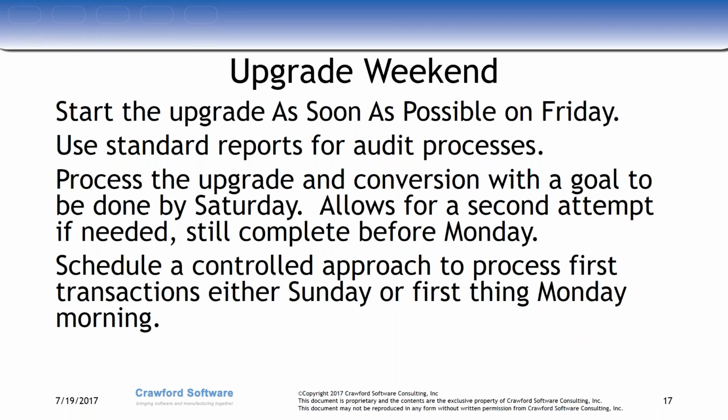We also include in our templates and our recommendations that you use audit reports. And we recommend using standard audit reports for the audit process. We don't use custom reports. Custom reports have a tendency to cause problems in the validation of the system. Part of what you're trying to do is identify was there any data loss or any data corruption, which shouldn't happen, but we want to put those safety measures in place to make sure we've checked and we can provide documentation and auditing that says we did check and we didn't lose anything. So using the standard stock status report, I have $1.2 million of inventory in my legacy system. I go through the conversion, I run that same stock status report, I have 1.2 million. Again, we print them, we store the PDF, we put it on the document repository.